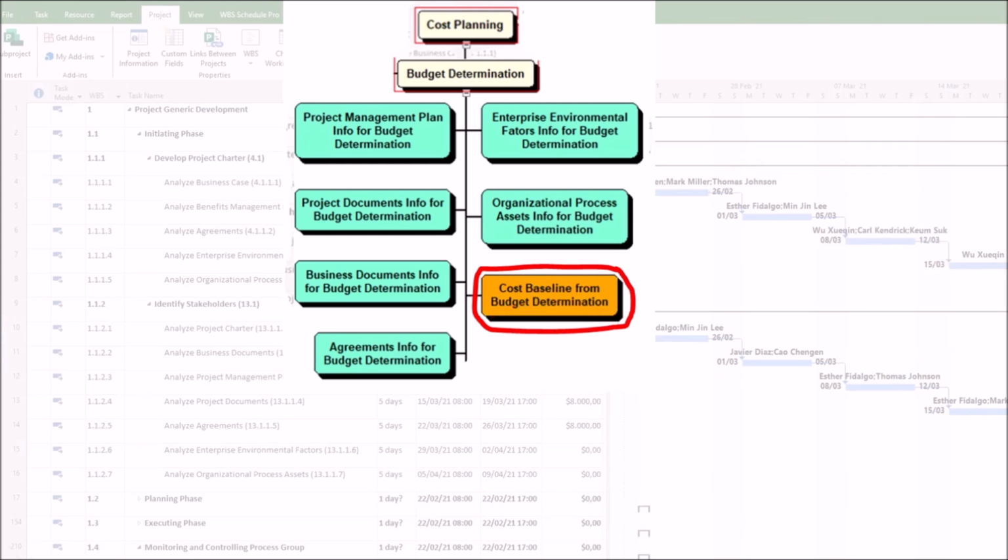In conclusion, a poorly constructed cost baseline compromises financial control, performance tracking, and stakeholder trust, ultimately jeopardizing project success. To avoid this, you should take the following steps. First, use historical data and realistic estimates, avoiding optimism bias. Second, ensure proper time phasing, aligning costs with the schedule. Third, validate assumptions with expert judgment and risk analysis. Fourth, secure stakeholder buy-in before finalizing the baseline.